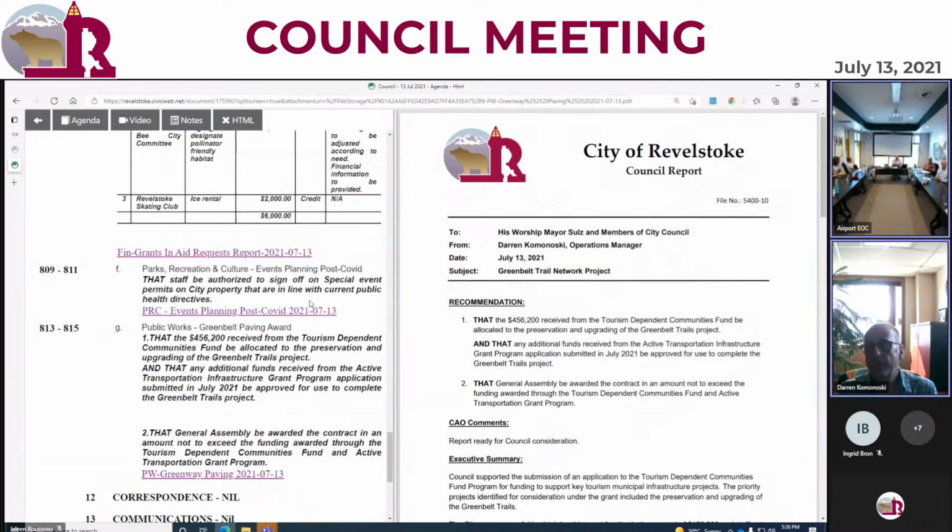Yes, Your Worship. Unfortunately, when you post positions or tenders this time of year, most construction companies are booked. So they throw, if I may use the word, an outlandish price at something, and sometimes it sticks. Unfortunately, we didn't have the option to put this out in February due to the application with the grant and our budgeting process. If we would put it out in the winter months, undoubtedly you would see better pricing come in and more contractors bid, because they wouldn't have their construction schedules filled for the construction season.